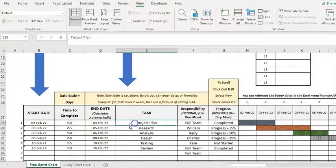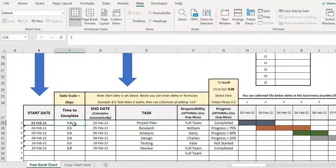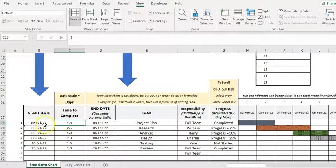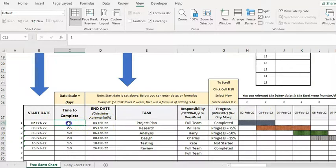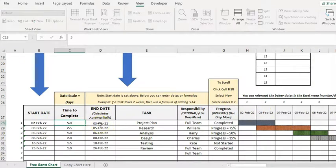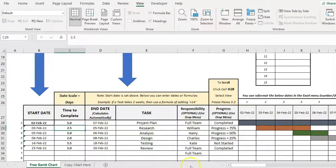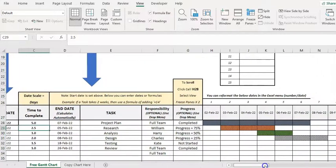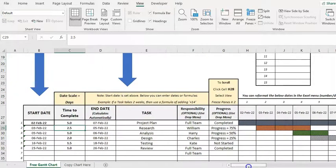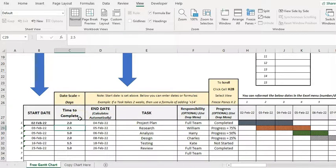So first task I've got the project plan. How long does it take to do? It's from one day, from the second to the third. If I make that a bit longer, make that five days, that then goes out to the seventh. So it just automatically adjusts that.